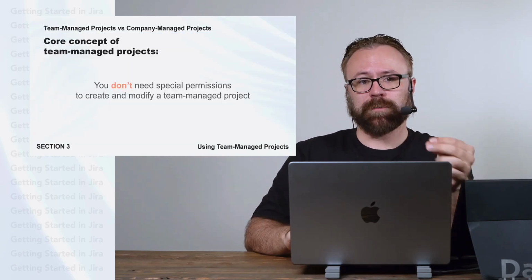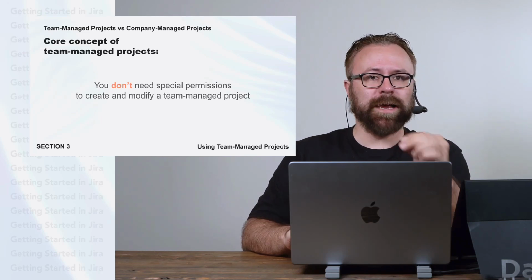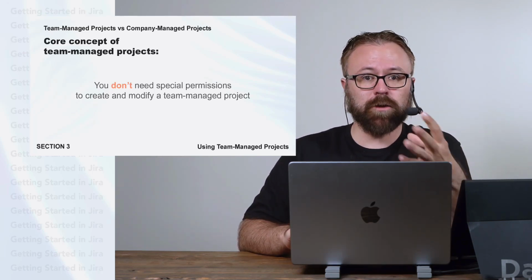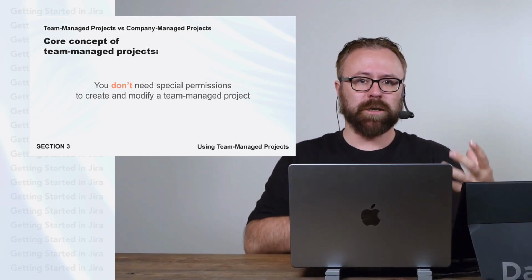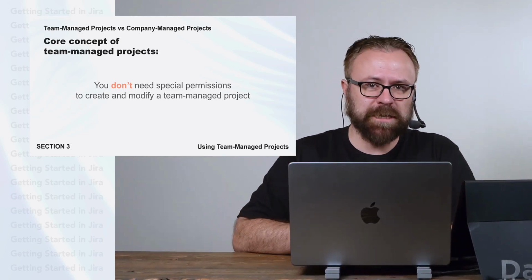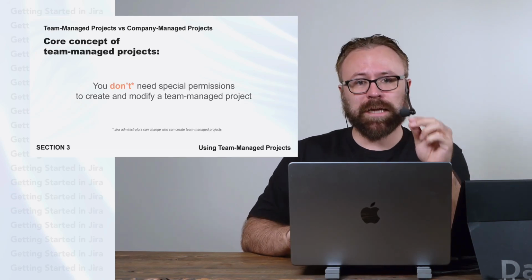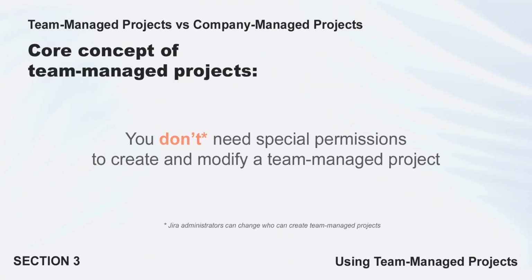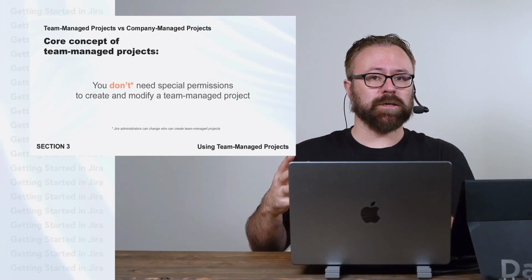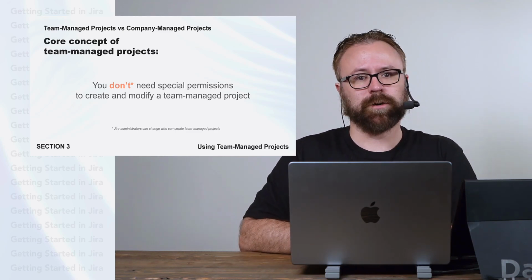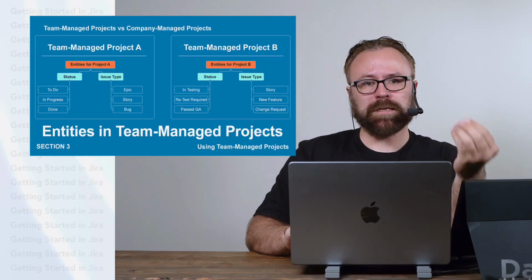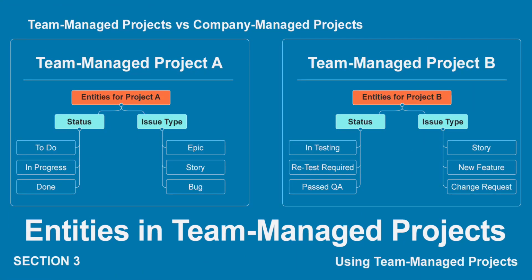And that core concept is that they don't require any special permissions to create. In other words, they can be managed completely by your team instead of relying on your company's Jira administrator, hence the name, team-managed projects. There is a caveat to that though, because Jira administrators can control who has permission to create team-managed projects. So if you can't create a team-managed project and you think you should be able to, reach out to your Jira administrator.